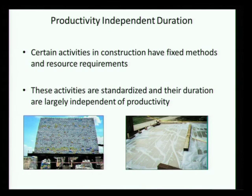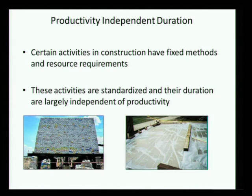There are certain durations which are independent of productivity. For example, a pile load test has to be done and will take a certain time regardless of what you do or how you do it. Same thing with curing of concrete — I can adjust curing based on curing compound, but given a certain spec, it will take its time to cure. Accelerated curing is possible, but within that spec that is what I have to wait for — I cannot change it based on crew size or anything else.